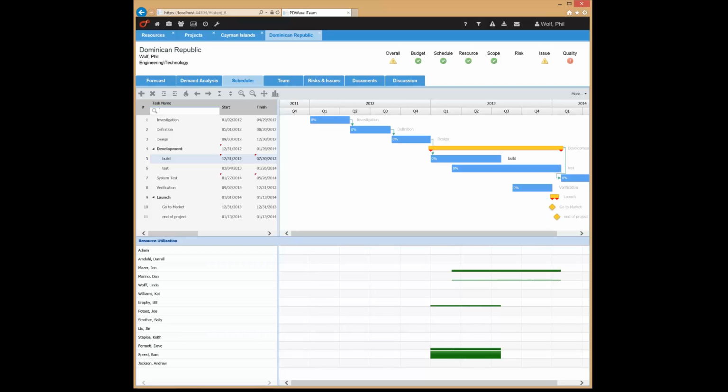The way that it works with the scheduler is actually interesting. The availability of the resources, how much they have been allocated in the effort forecast to your project. The availability for the effort forecast is the availability of the resource, their capacity; the availability for the Gantt is how much they're actually available in the effort forecast for that project in total.